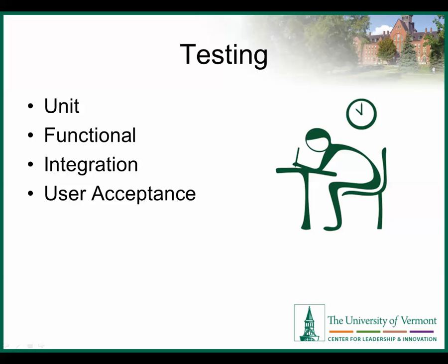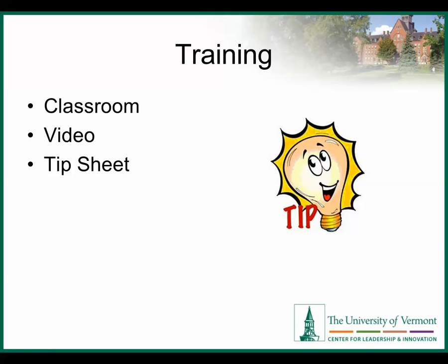And then user acceptance testing, making sure that whoever is going to use the system tests the system out in the current workflow and makes sure that it works for them. And then training, making sure that you have the right training. If it's complex, you may want to do classroom training, but if it's less complex, you could do it in a video or a tip sheet.